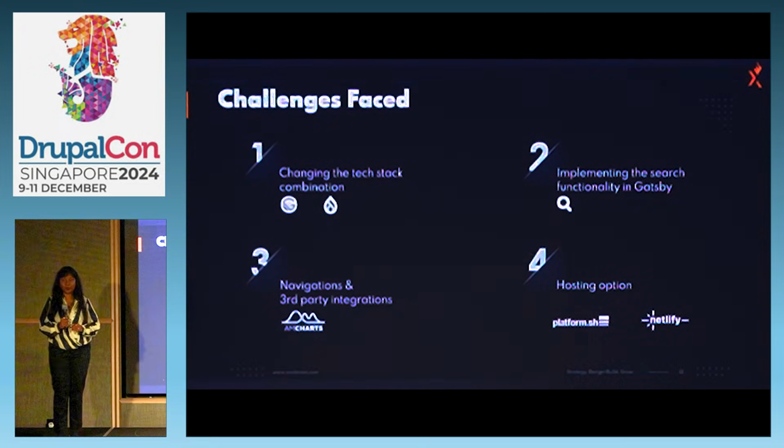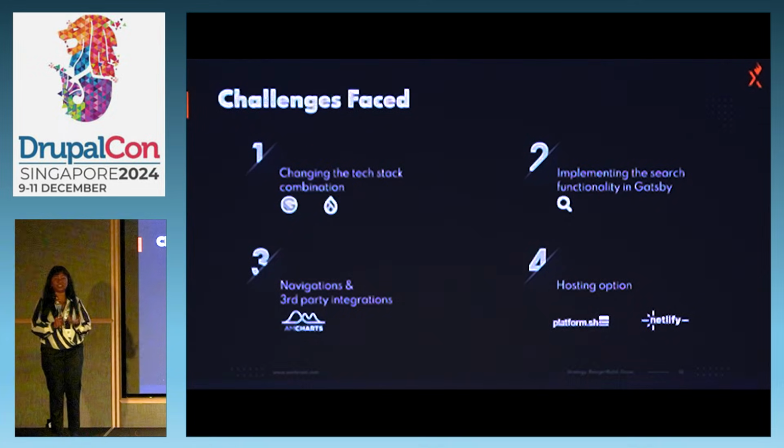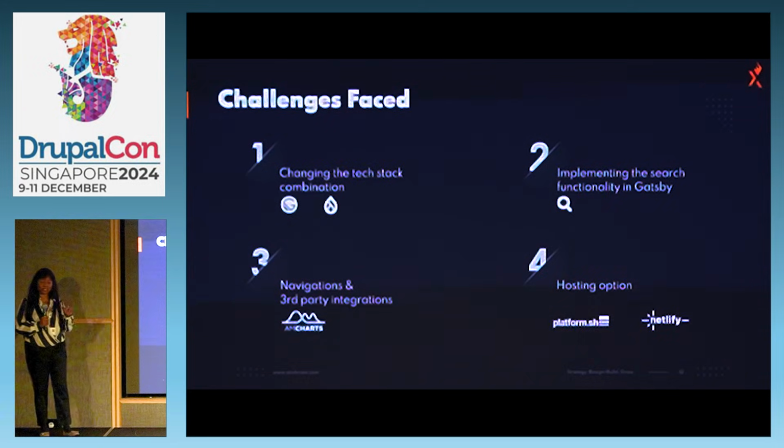With the paragraph reports, we found out how many paragraphs had been used and analyzed the impact, and we started with the most impacted ones. That's how we migrated. Otherwise, definitely the 29 paragraphs within that timeline was not possible. So we just went with that.